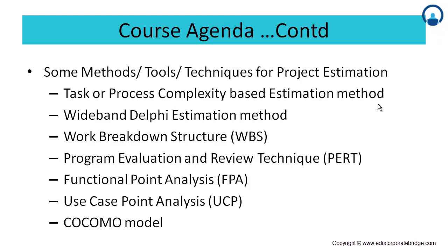Similar is the case for use case points as well, UCP. Here again the requirements or the size are collected in the form of use case points, and then again we can follow any technology, whether it could be Java J2EE, Microsoft or other technologies. Then you have the COCOMO model, which is an algorithm based software estimation model being used with parameters which are derived from historical project data and current as well as future project characteristics.